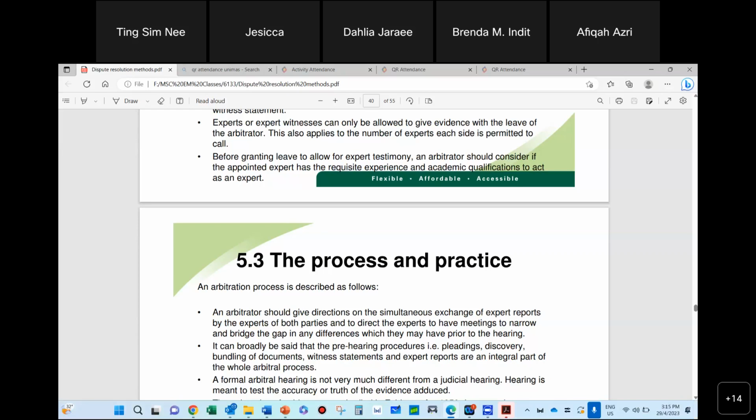Arbitration, another good thing, is a very closed process, meaning that the result need not be published in newspapers or anything like that. Whereas in court, reporters can sit in and listen to all these proceedings because it's legal, it's their right. Unless you call for a closed court, and normally, because of transparency, unless you have a very, very specific reason why you cannot have an open court, there's no reason why the judge should let you have a closed court. So anybody can sit in. You, me, anybody can sit in.